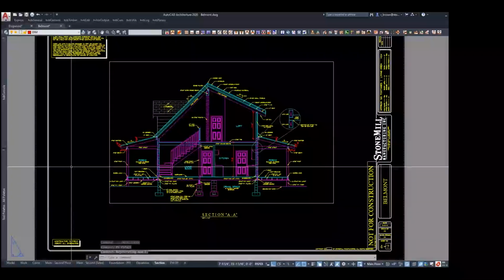As with any business, our schedule ebbs and flows depending on the sales volume at any given time and how many people we have in the queue. But I've seen it take as little as 3 to 4 months. It's probably one of the fastest I've seen, going from concept sketch to fully engineered plans. It's taken us as little as 3 months. I've seen people take 5, 6, 7 years. It's all on your timeline. And that's part of what the project management services offer: once you've contracted with us, we really try to work with you and your schedule and sort of back into it.